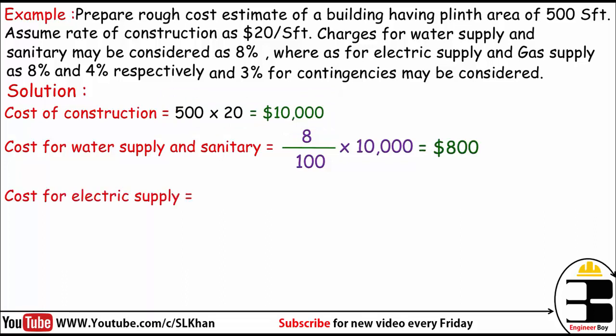We can now calculate the cost of electric supply, which is also 8% — the same rate as water supply and sanitary. So the cost of electric supply is also $800.